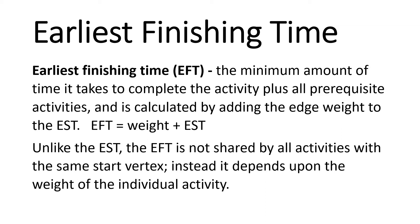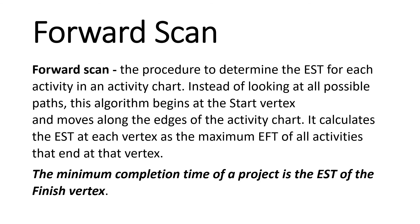Hopefully all of this will make sense once we do some examples. A forward scan is the procedure to determine the earliest starting time for each activity in an activity chart. Instead of looking at all possible paths, this algorithm begins at the start vertex and moves along the edges of the activity chart. It calculates the earliest starting time at each vertex as the maximum earliest finishing time of all activities that end at that vertex, taking into account how much time must pass before you can start a certain activity. The minimum completion time of a project is the earliest starting time of the finished vertex.